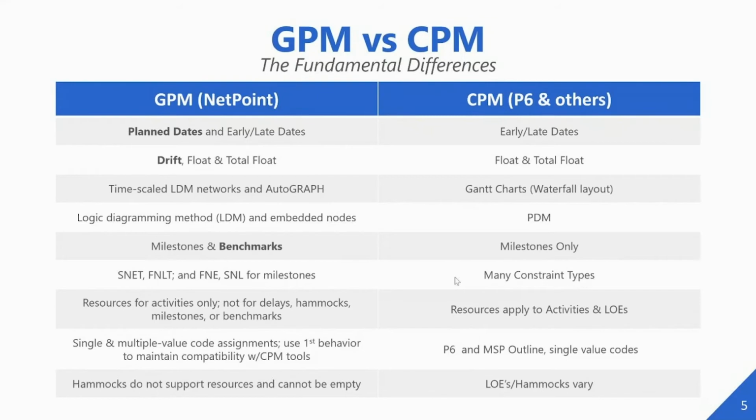canvas. However, if you're bringing a P6 schedule into NetPoint, that P6 file will not have any location information that is required by NetPoint to lay out your schedule in that manner. One approach you could use after you have brought the P6 file into NetPoint is the inbuilt layout manager tool called Autograph, which will help you lay out your schedule in a much better manner with a single click.